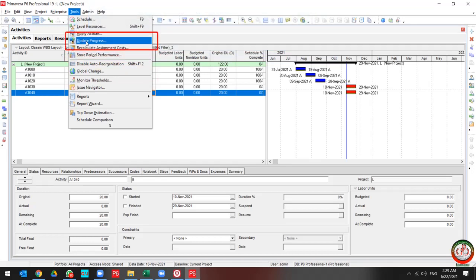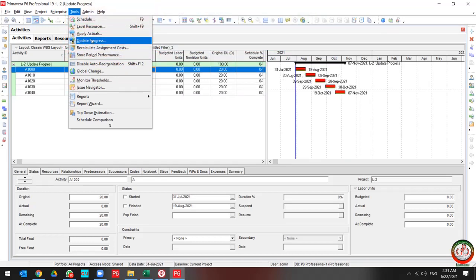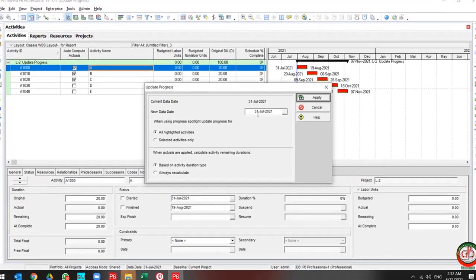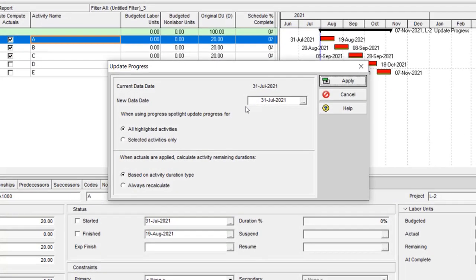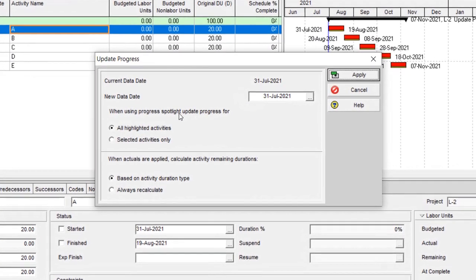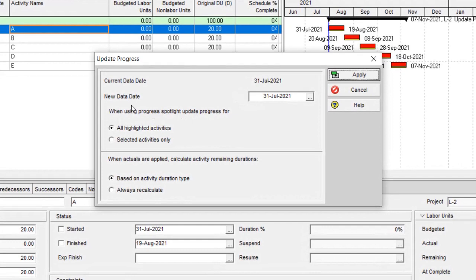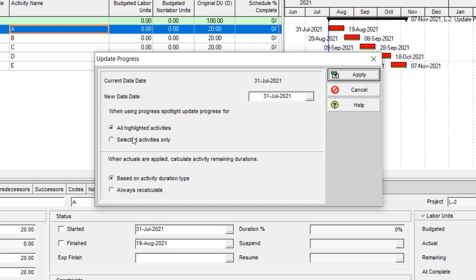Update Progress. This is the Update Progress dialog box. When you open the Update Progress dialog box, you can update all the activities or you can update selected activities.